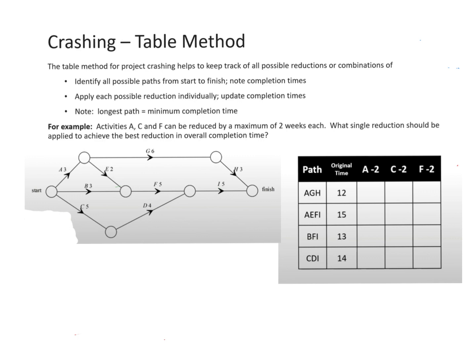So for this table method, we might write a few little notes. This method does show the critical path, but the only thing is it doesn't show the float times, or the individual activity times that the other method does.